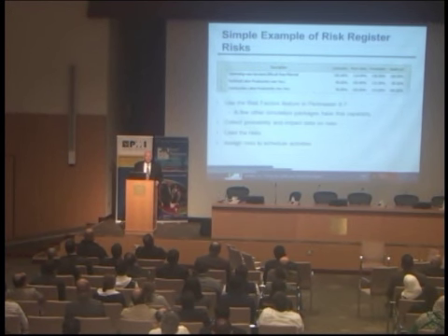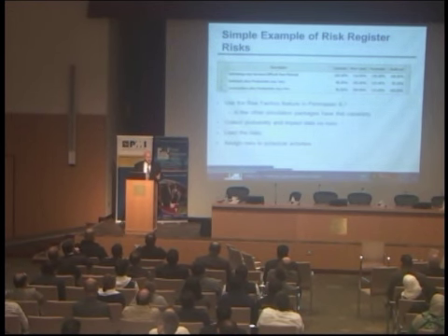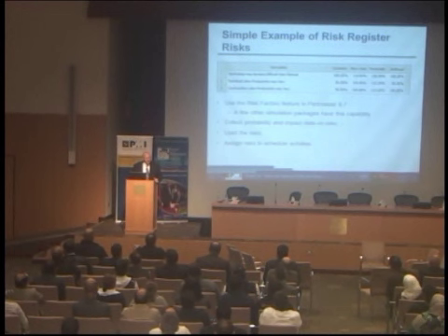That's all they have. And that is the factor that is multiplied into the durations of the activities it's assigned to. So you get the probability that it occurs. If it occurs on this iteration, there's a multiplicative assignment. If it doesn't occur on this iteration, the multiplicative number is 1.0, which is neutral, and will not change the duration.